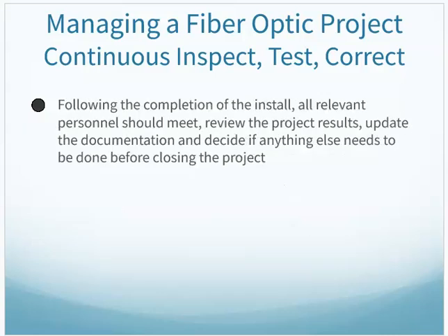After the install, relevant personnel should meet and review to make sure everything got done and everything's documented correctly before you sign off and basically close out the job. So there's our chapter on design.